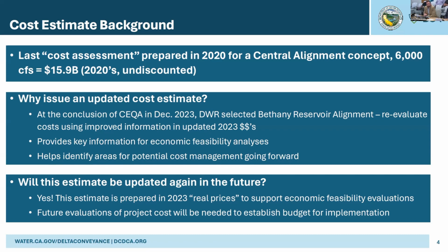The next question, will the estimate be updated again in the future? Absolutely. This is an estimate that's being prepared in 2023 real prices. Again, that's an economic term that Dr. Sunding can fully define, but the point is this is intended to support an apples to apples comparison in the benefit cost analysis. So it's helpful for us on the cost estimating side to prepare it in a consistent dollar basis. So we've prepared this estimate in 2023 and the benefit cost analysis really takes it from there.